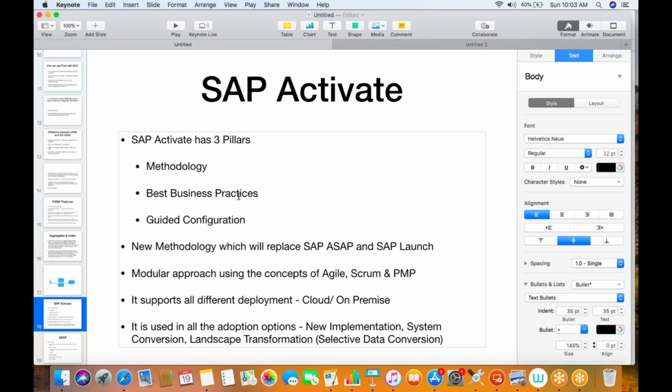Okay. But again, you don't need to wait till 100% is completed. See, normally what we do in the normal implementation approach is we get all the requirements and we take 1 year, 1.5 years of time because we want to develop all the things and we want to do the big bang go live, right? In one go. In this case, SAP is recommending don't do that, because what will happen unnecessarily is you'll not be able to realize whatever things are fitting your requirements for the next 1 year. At least whatever things are fit, go ahead with that and then slowly keep on upgrading your system. Right. Got it.